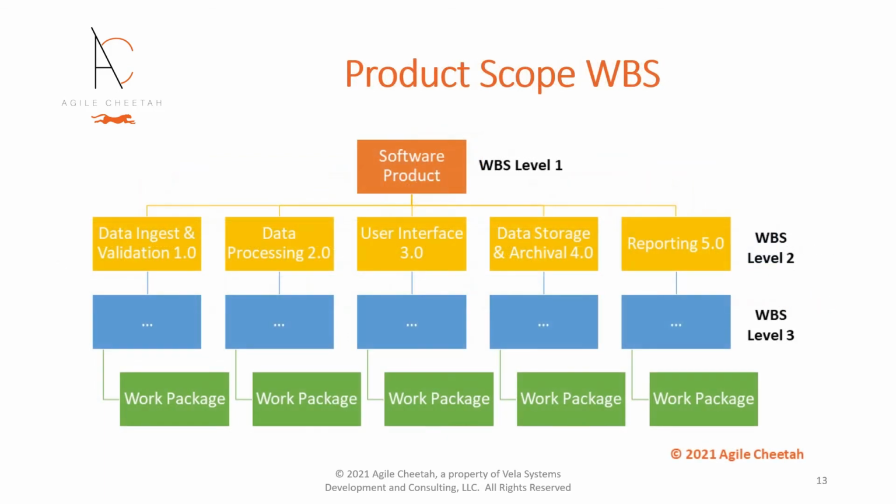A product scope WBS defines project work in terms of the components, physical or functional, that make up a deliverable or product. In this case, the first word of each WBS name is a noun, such as Module A, Subsystem B, Aircraft Engine, Fuselage, etc. Since each element represents a part of the overall product, this WBS is sometimes called a Product Breakdown Structure, or PBS.